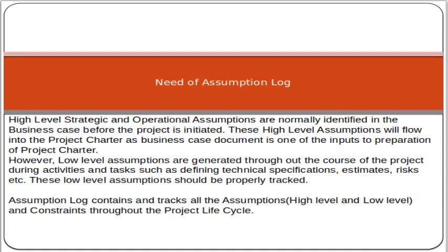Okay, then the need of assumption log. The need of assumption log is that high level strategic and operational assumptions are normally identified in the business case before the project is initiated. These high level assumptions will flow into the project charter, as the business case document is one of the inputs to preparation of the project charter. However, low level assumptions are generated throughout the course of the project during activities and tasks such as defining technical specification, estimating, risk, etc. Assumption log contains and tracks all assumptions, high level and low level, and constraints throughout the project lifecycle.